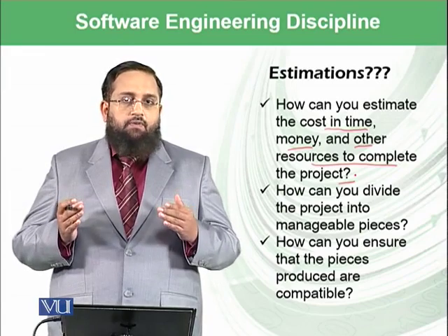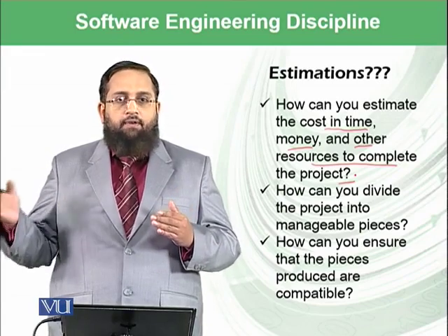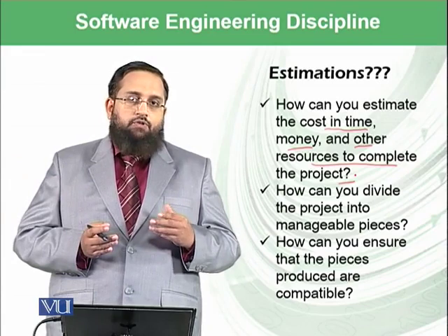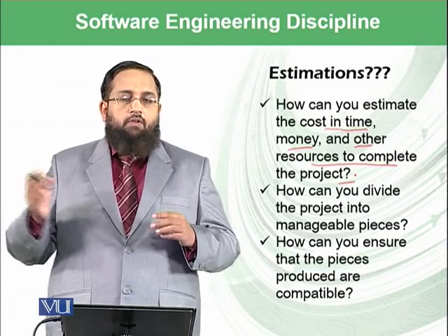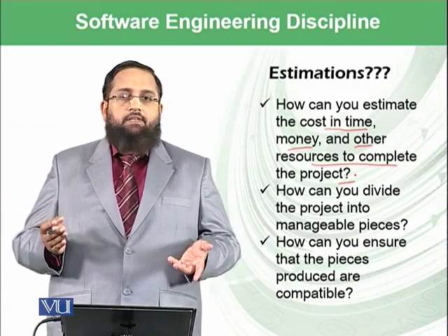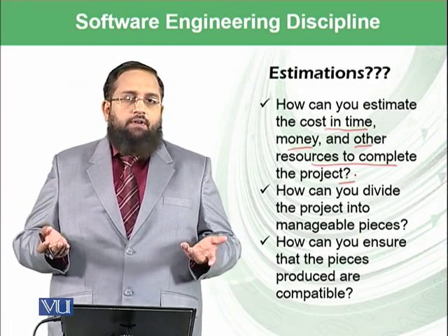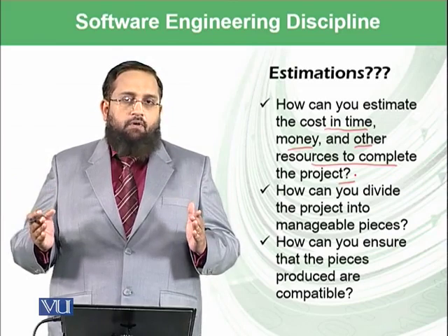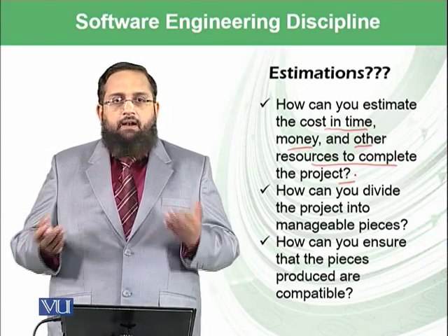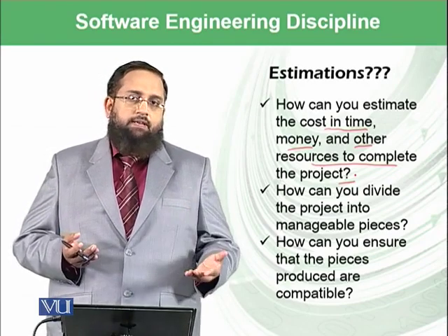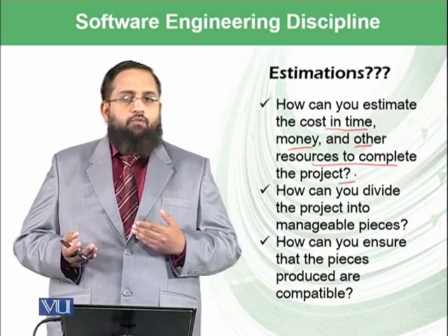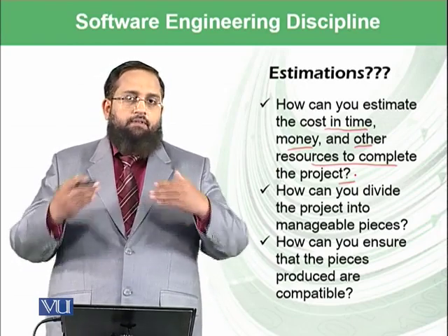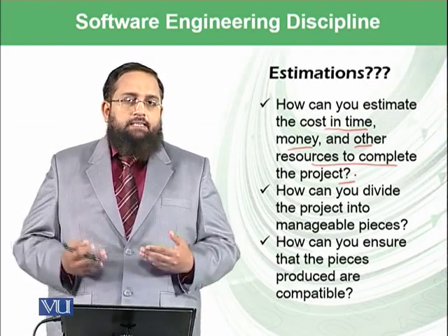So you need to estimate the cost, and that cost, time and resources are not generalized ones. For example, if you have done 100 projects, you cannot simply apply the knowledge of the 100 projects and say, okay, roughly on average I used to take 1 year to complete a project, so I estimate that I will need 1 year for this project as well, which is now being offered to you. This may take more than 1 year or it may take less than 1 year.